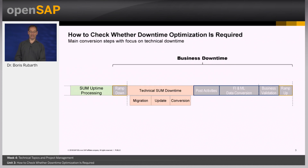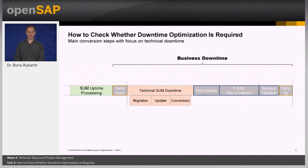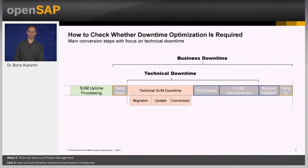Looking at the overall process of the technical conversion, you see blocks in green — these are uptime processing. We have a ramp down, a technical SUM downtime with specific parts, and post activities including FI and ML data conversion. The overall business downtime is influenced not only by the SUM itself, but also by things like business validation or regression tests. We always have to distinguish between business downtime and technical downtime influenced by the Software Update Manager.